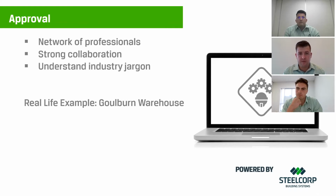That's good. Yeah, often a difficult stage or phase of the project, and it's often frustrating for our clients because they can't see the progress that's happening. Mm-hmm. But once this is ticked off, it's always good to see things start to roll quickly. Shane, an example of a Goulburn client that we are working with at the moment? Yeah, we've got a client at the moment that is in a bushfire zone, and it's a bit confusing for the client how to handle that one. There's obviously a lot of requirements on his building, like boundary firewalls and whatnot, and also which permit process to take.